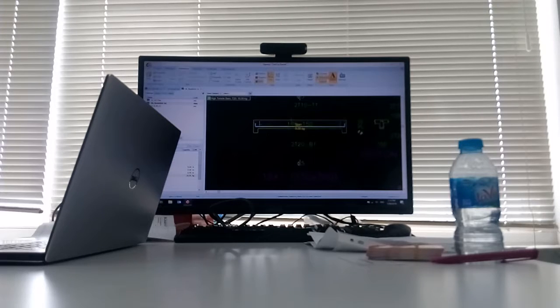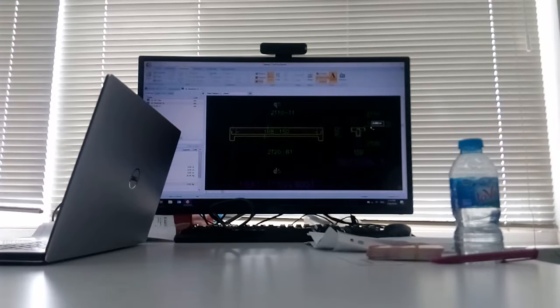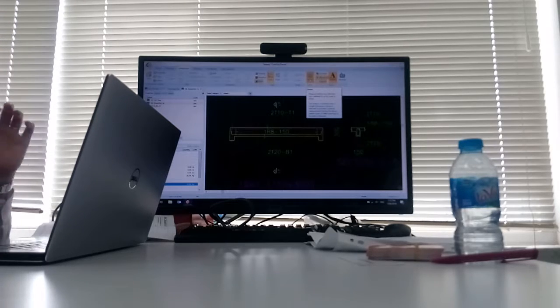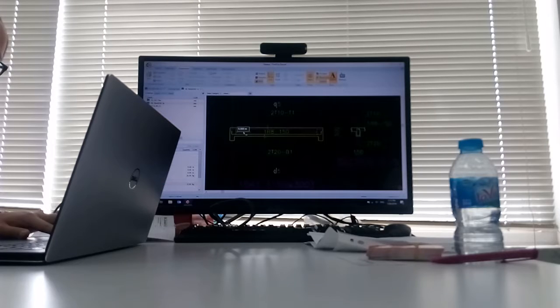While we have the stirrups over here, I create another one, R8, because this one is R8 spacing 150. There is a rebar mode on top. When you click this, the steps are a little bit different. So this is the thing that you might need to take notes on. First, highlight the spacing. This is the spacing for my stirrups.